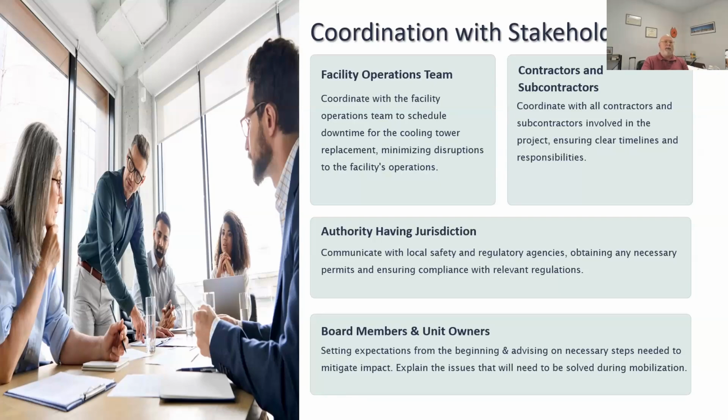Again, this is typically something that as an engineer, I have someone available on the week that we're going to do the lift, that we're actually going to shut the equipment down, take the old equipment off, put the new equipment on. I try to make sure that I have someone available, and if I don't have someone available, I'll make myself available to, if not be on site, at least be on standby to be able to pick up the phone and say, oh, hey, we lifted this tower up and this is the issue that we came into. And so having that timeline and responsibility to make sure everybody knows what they need to do is critical.